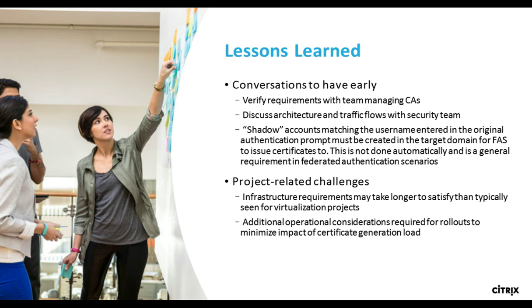From a project perspective, infrastructure requirements may take a lot longer to satisfy than typically seen for virtualization projects. So if you're expecting that this is going to stand up in a week or two, you may want to add a little bit more extra time to the project plan, just to make sure that you allocate for some of the complexities that this is going to add to your system.